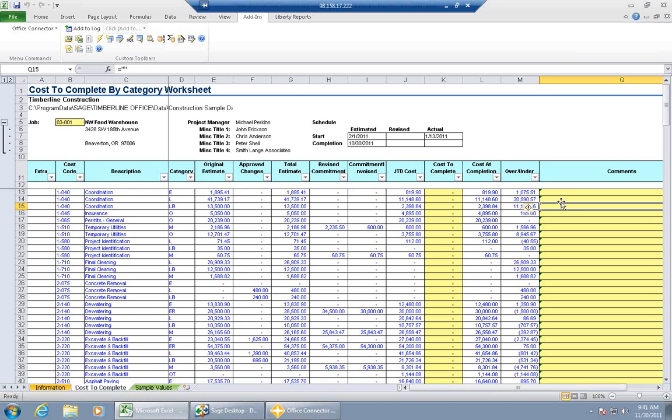So they would want that all on one sheet, or you could really keep a workbook of the cost to complete and have each month on a separate sheet. That is correct. And then link it back to this column. Correct. And then when the month has passed, so you're not projecting that one anymore, you just save it as values. Yep, and you have whatever the last projection was for that month, or every month you save them as values, so that you have a complete history.